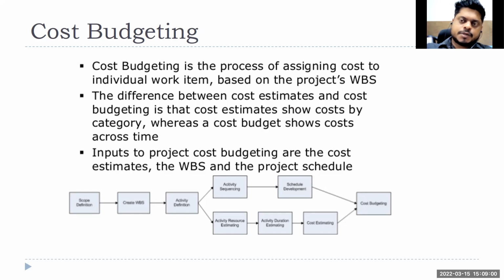In the last 3 months of the financial year, January, February, March, the finance CFO team will be looking into how to reduce the cost, because they have to show the overall yearly financial result to the board of directors. If you go and tell them that you need this much money, none of the CFOs is going to approve that amount. So as a project manager, you should be intelligent enough to put all your cost from April to December.